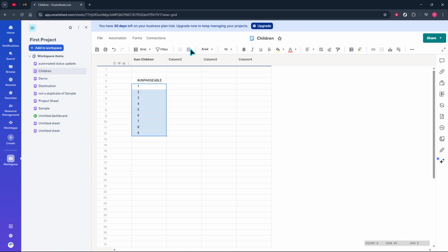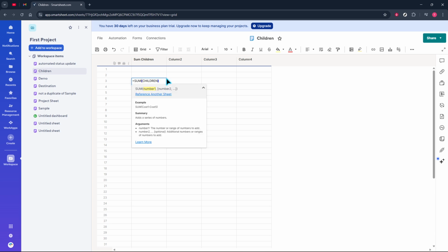First, confirm the hierarchy. Select the rows you want included in the roll-up from top to bottom, then click the indent button on the right side of the toolbar. You'll see the rows shift slightly to the right and a small hierarchy indicator appear. That visual change confirms they're nested under the parent. This hierarchy is essential because the CHILDREN function only references the indented rows directly under the parent, not grandchildren or unrelated rows.